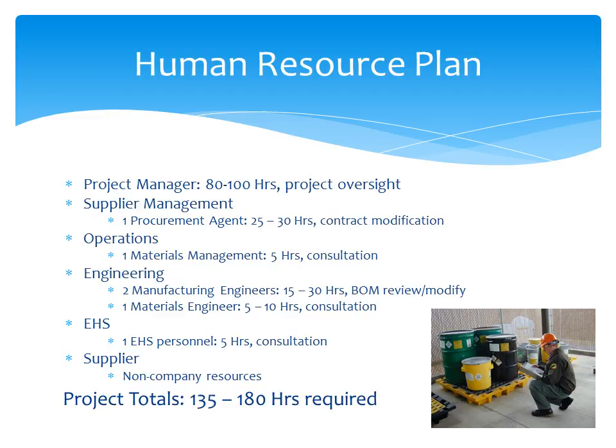Our plan includes a project manager for oversight, supplier management for contract modification, operations for consultation, engineering for both the BOM review and modification and consultation, EHS for consultation, and supplier, although the hours spent at the supplier are non-company resources, they're still significant and deserve our attention. Total project totals are between 135 and 180 hours total required for this project.